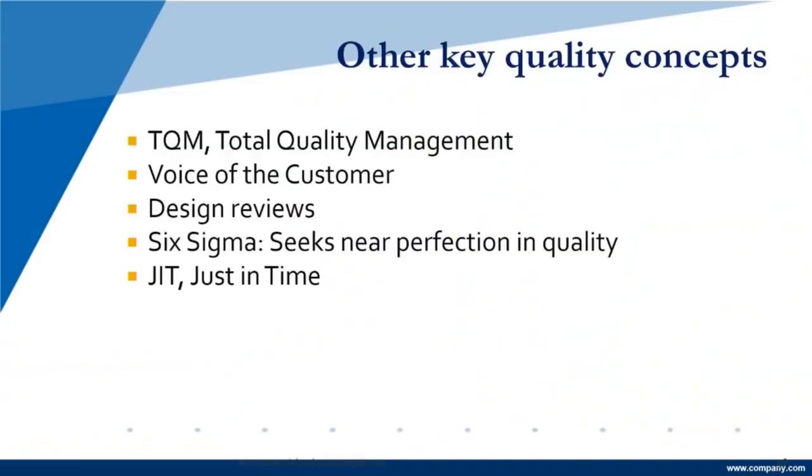We have design reviews. And design reviews is a quality concept because we want to know what we're trying to do. So let's pose two different things on design reviews. One is an application. So it's a service, let's say, that we're presenting to the customer. And the design review in that case could be as easily as having the designers and the owners of an application roll out that design and allow people to see it, customers, potential customers, so that they can make comments about, does it fit the need that they saw?